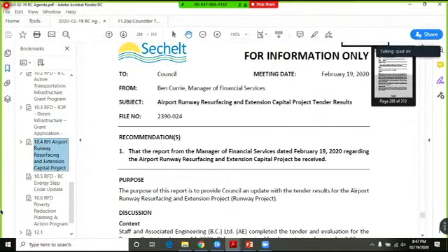Thank you. I think we all understand that when the initial work was done, the initial budget amount that we went forward with, we hadn't actually had the engineers come out and look at the state of the current airport runway. We assumed at that point that we could just replace the asphalt on the piece that we have. Once the engineers came out and actually looked at the airport runway, they found that we would actually have to do a lot of work to the substructure to make that go forward. And that, and the aprons that they've now added in, saying if we're doing the runway, we should also do the aprons at the same time, has brought the cost up.